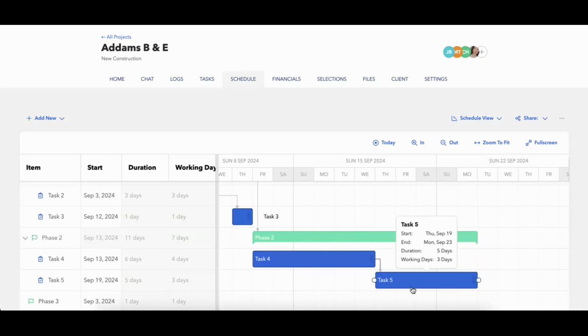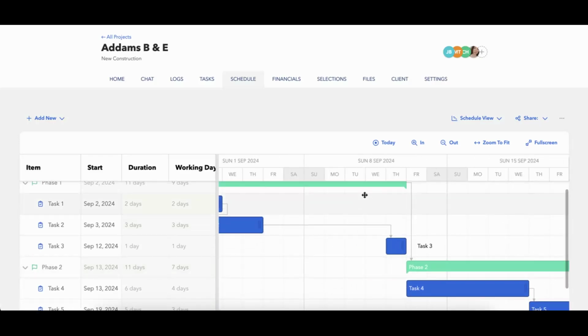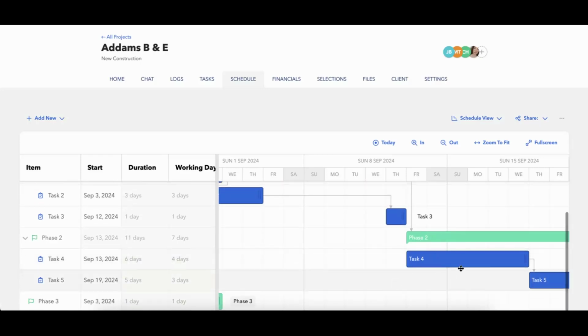And it's designed like that because the rule here for the auto schedule, at least, is that this phase just has to end before this phase can begin. It doesn't matter when the tasks necessarily start inside of it if there are no dependencies. It is essentially designed to just push information across the board.